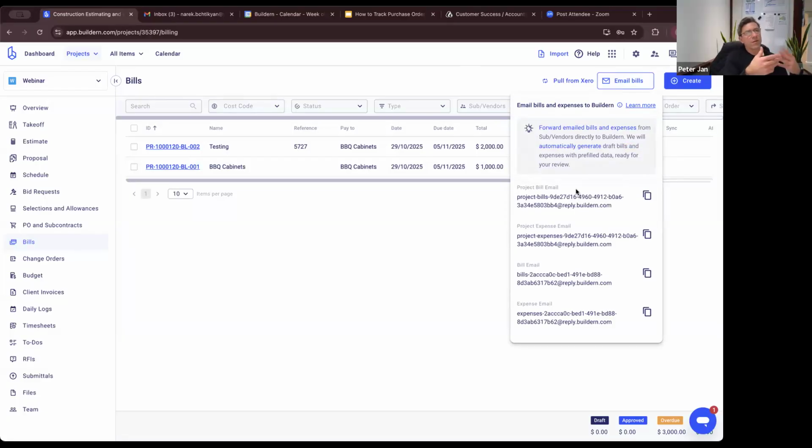I understand. So I think the way forward for us will be that we create a purchase order. So that goes as a bid to 4 companies. We approve one. Then we say, okay, we'd like to go ahead. This is the criteria that they say they're going to meet. They send us the bill, which is their invoice.